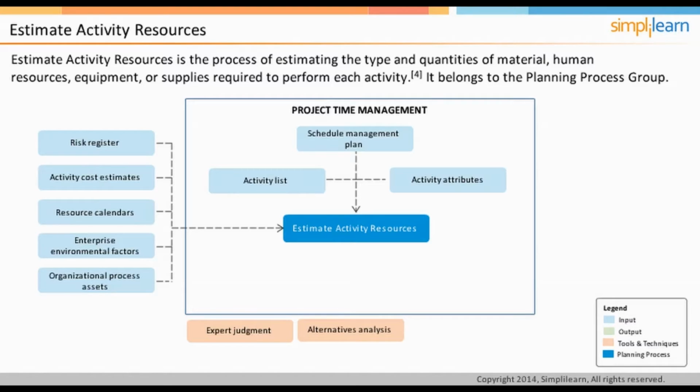Along with the two techniques, many organizations routinely publish their estimating data, and this could be used in activity resource estimation. Another technique that is routinely used in activity estimation is bottom-up estimating, which is decomposing the activity further down to understand it in more detail and estimating at that level. Later, all such estimates are added to arrive at the estimate of the activity. In real projects, one has to use all to estimate each of the activities. Sometimes, the project management software also helps in estimating. The software estimates are based on the inputs provided to it.